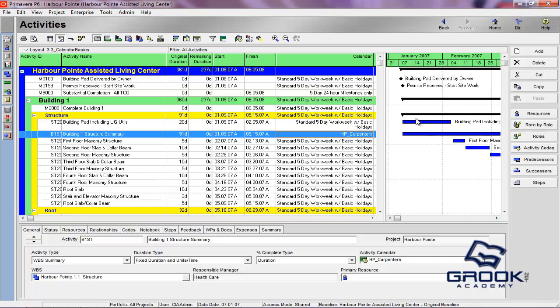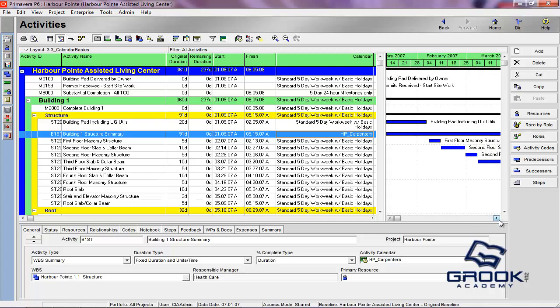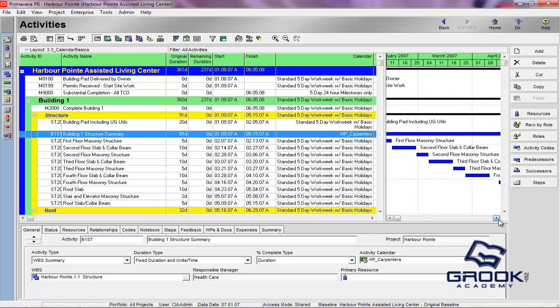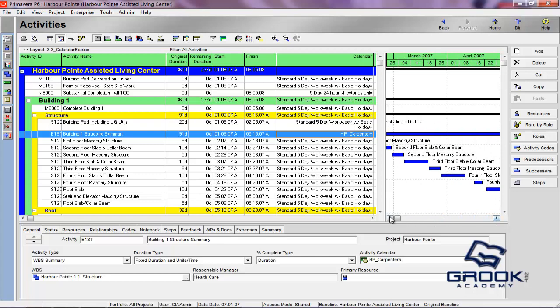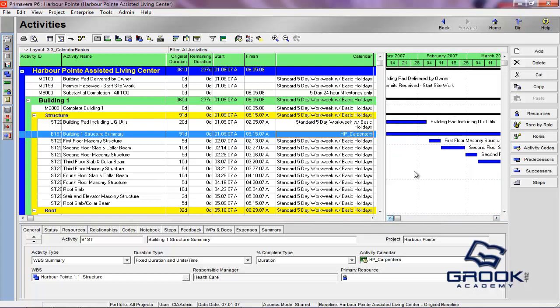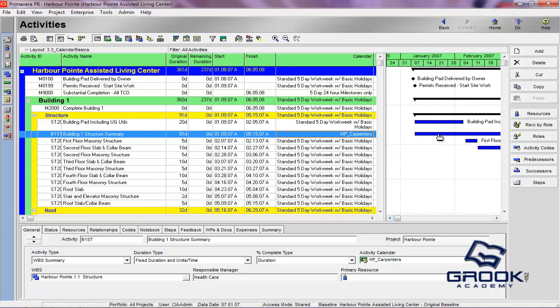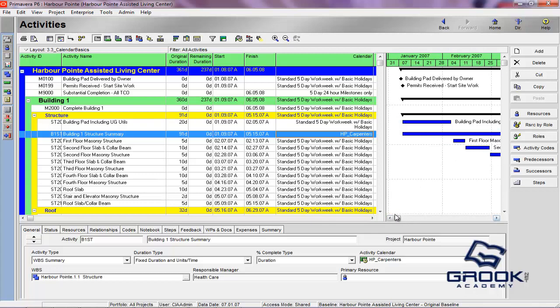Now, what that does in your Gantt chart is if you were to drill down on the timescale here to a level that showed days, it would show you that this activity would not occur on a Friday, but it would occur on Sundays. So when you do your resource leveling or Primavera calculates the duration of this activity for you, it would take into consideration that work could not go on on Fridays, but could go on on Sundays.